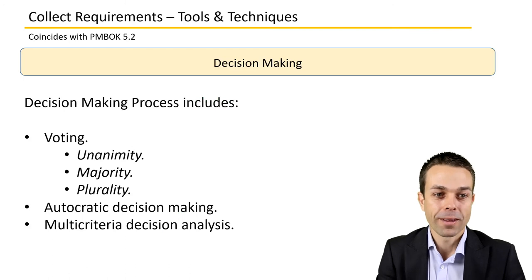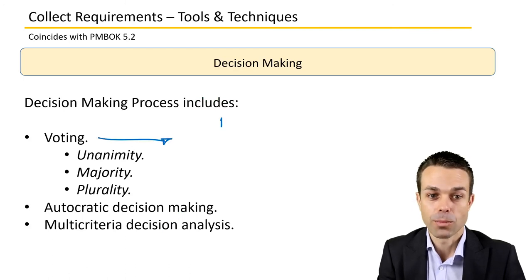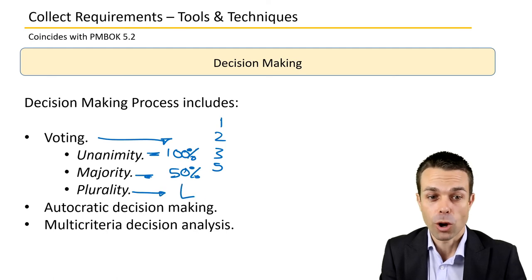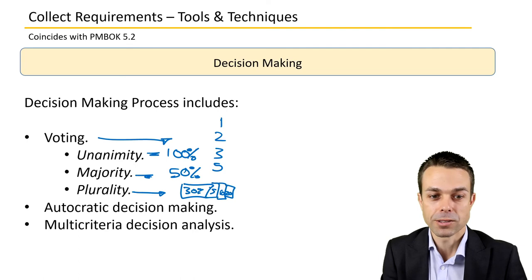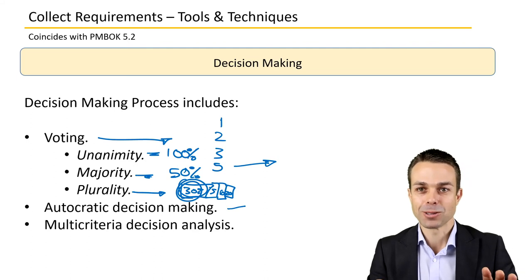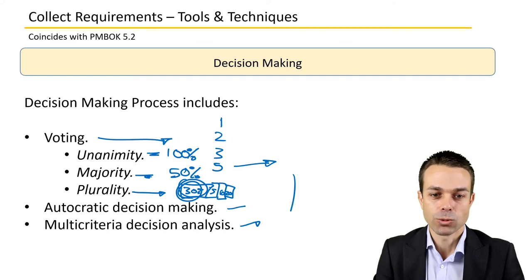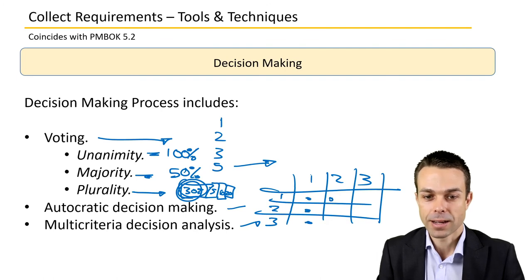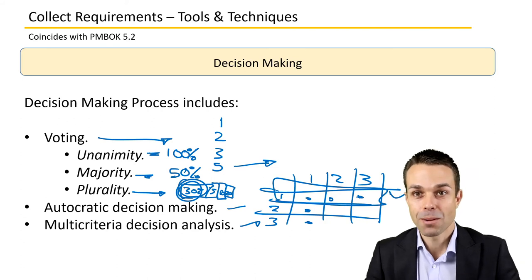We'll need to make decisions along the way, which may involve voting on requirements — which is most important, which is least. Unanimity is where 100% of people agree. Majority is 50% agreeing. Plurality is just the largest block compared to all other blocks — for example, 30% versus groups of 5, 10, and 20. You will see an exam question on voting and those differences. Autocratic decision making is where one person just decides the way forward. Multi-criteria decision analysis has different options and criteria in a matrix — whichever option meets the most criteria is selected.